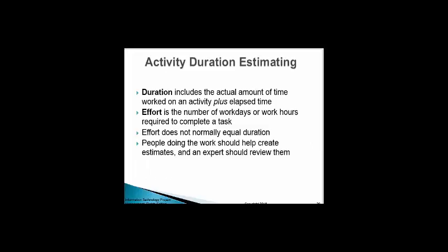Then we move on to activity duration estimating. And we have to worry about the duration, which includes the actual amount of work, the effort, which is the number of work days or work hours required to complete a task, and then knowing which unit we're in. Okay, and that could be one day, could be 8 hours, so we have to define that, and we can actually define that in our Project 2013.